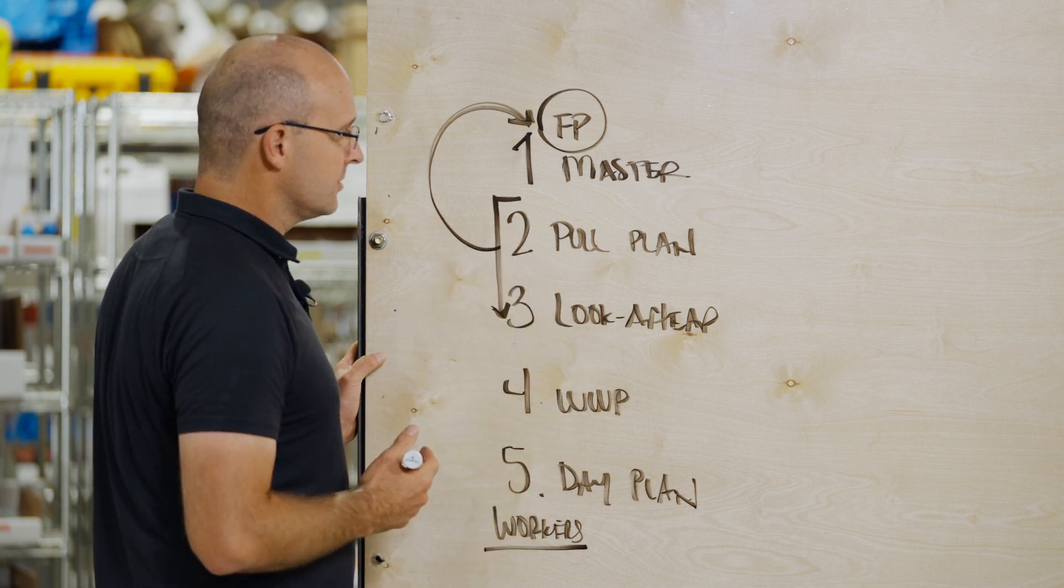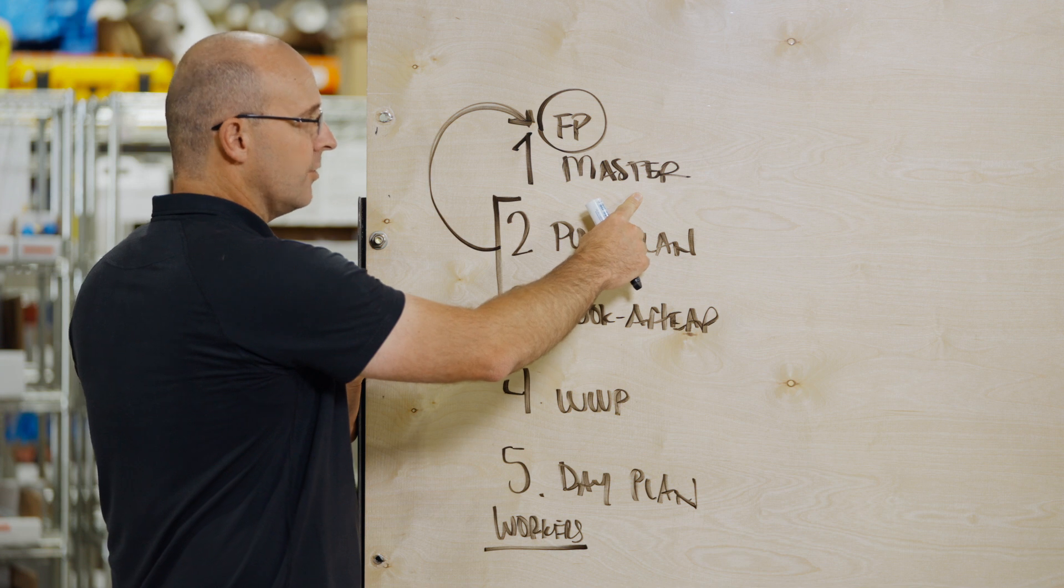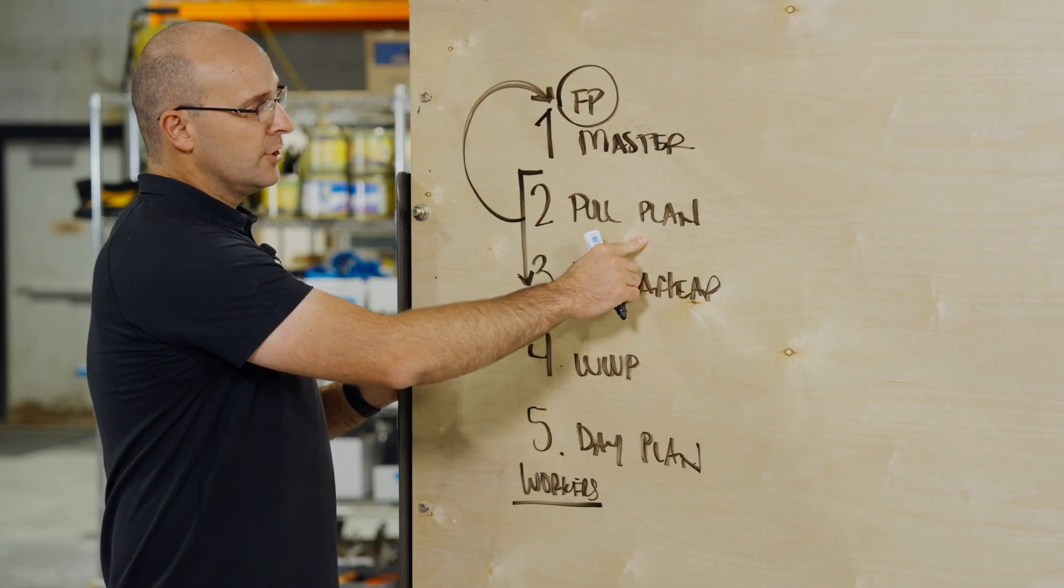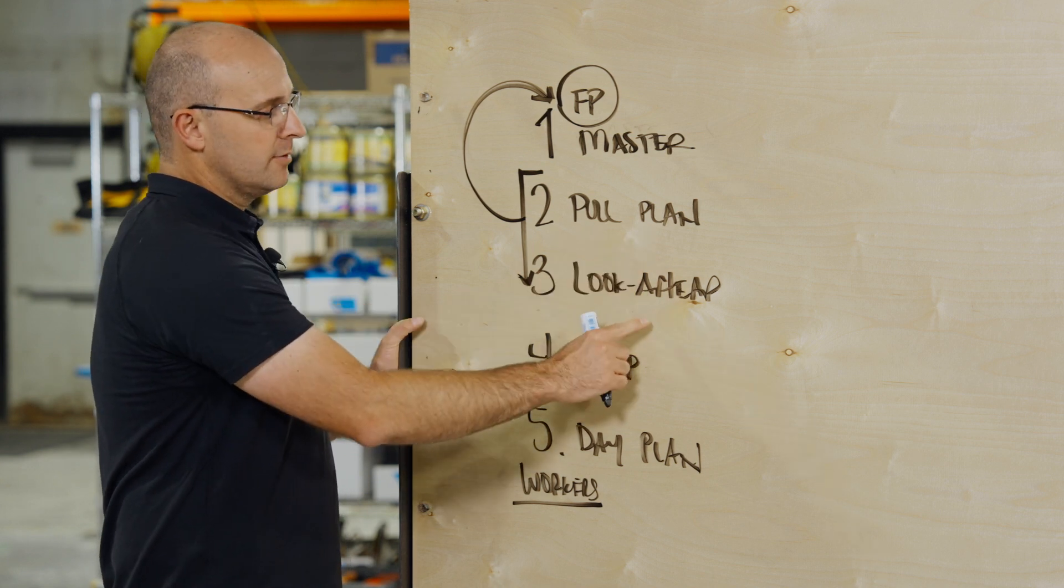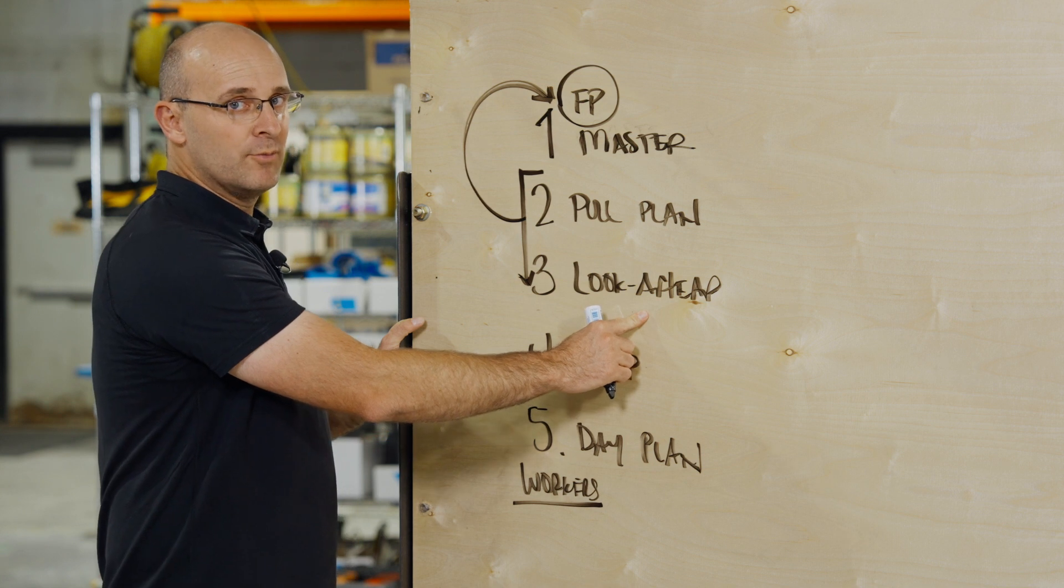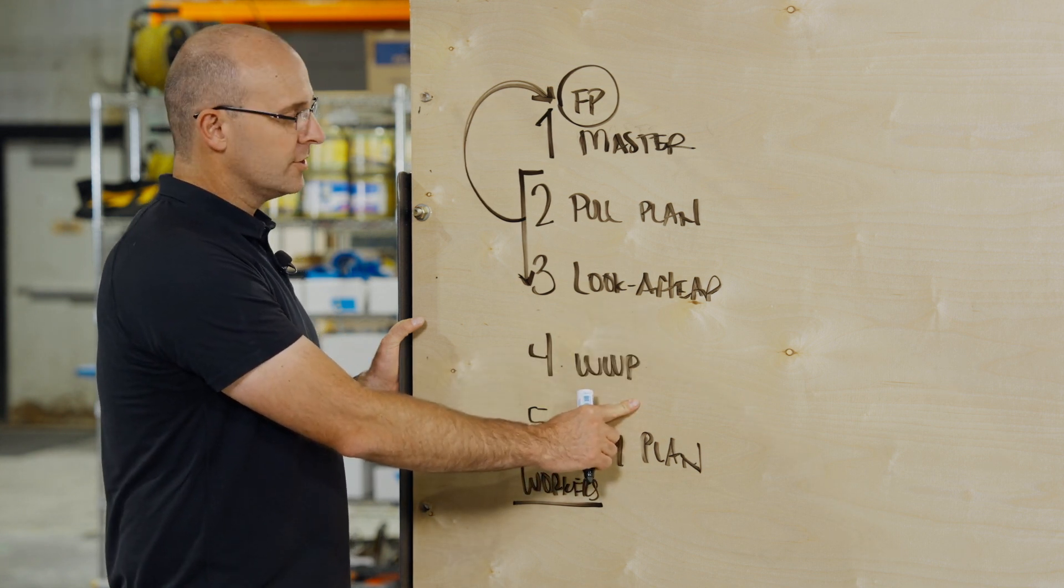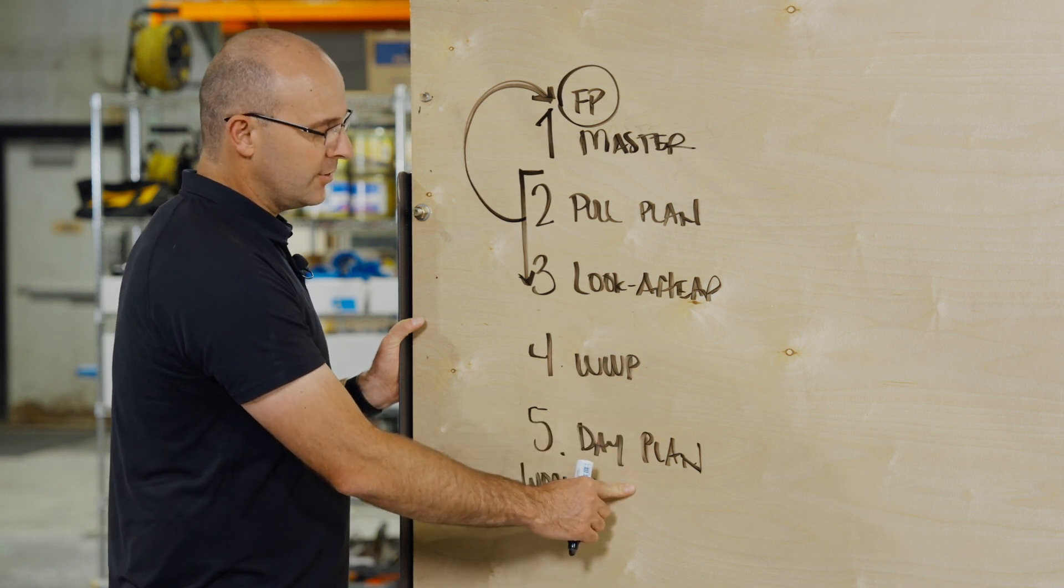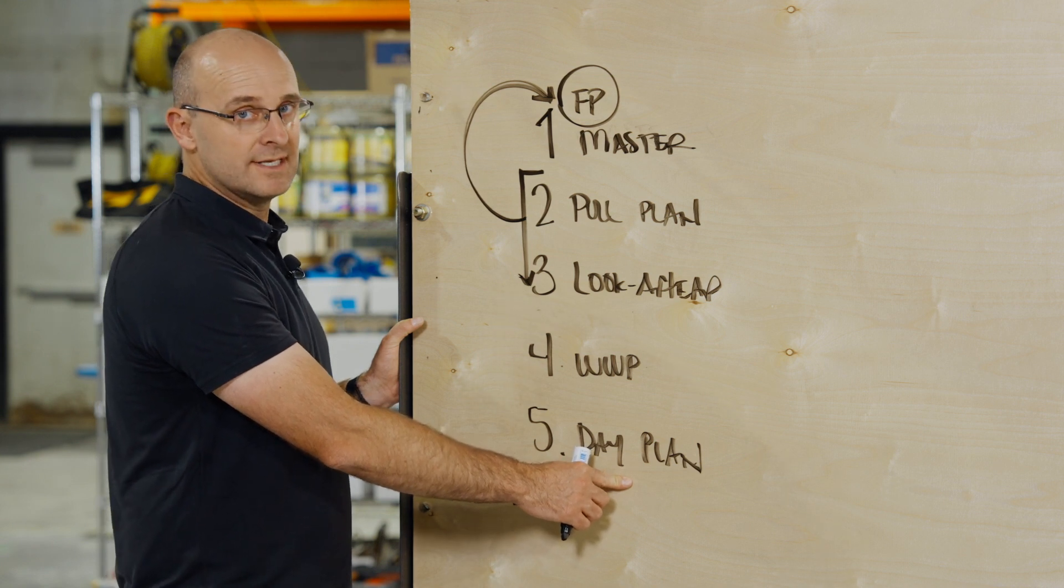So these are the schedule deliverables. Number one, a master schedule is for your milestones and your overall duration. Number two, your pull plan is for your sequence and to get a collaborative plan. Number three, your look ahead is to make work ready and remove roadblocks. Number four, your weekly work plan is for your trades to collaborate and commit. And your day plan is to communicate to everyone on the project site what the plan for the day is.